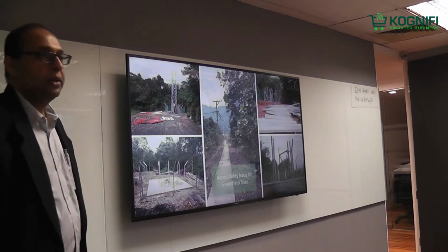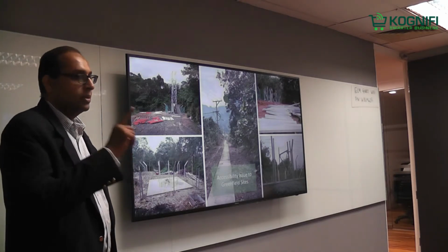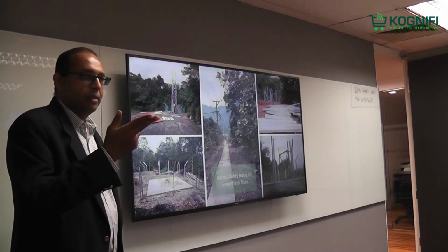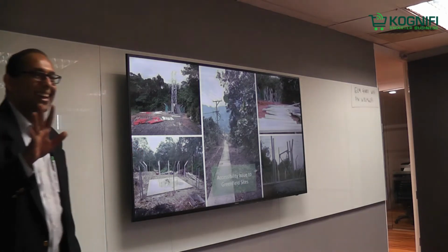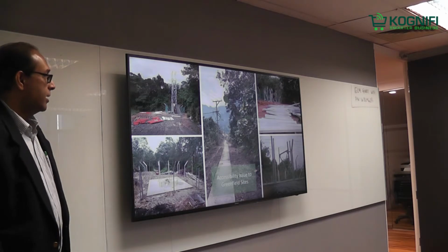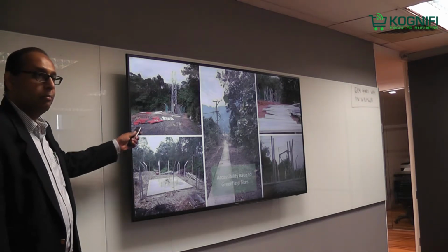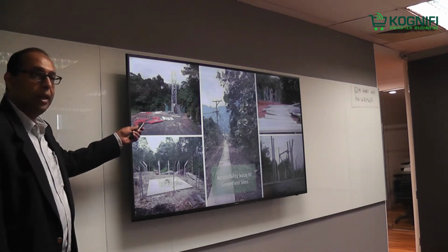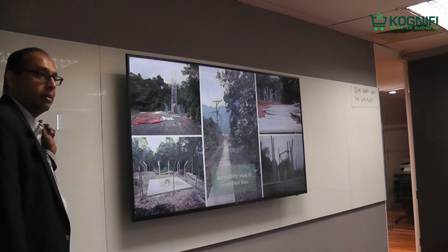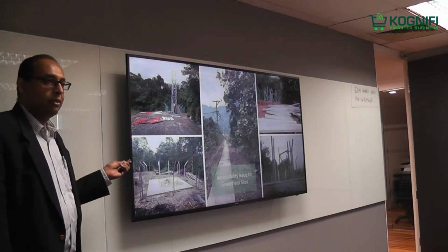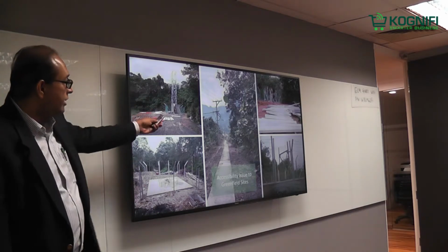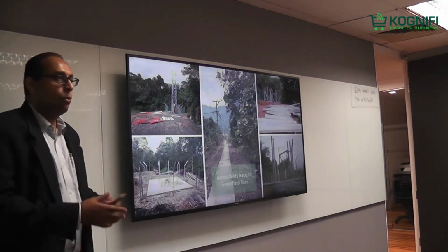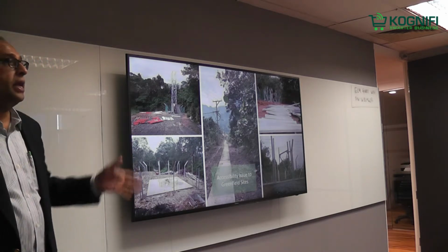Here you deal with a private landowner. If it's one person, the same day, next day. If it's 5 family members, it's still happening. You can have the land here, but the only way you can cut a path to that land is through your neighbor's land. You still have to get the acquisition for the right of way.